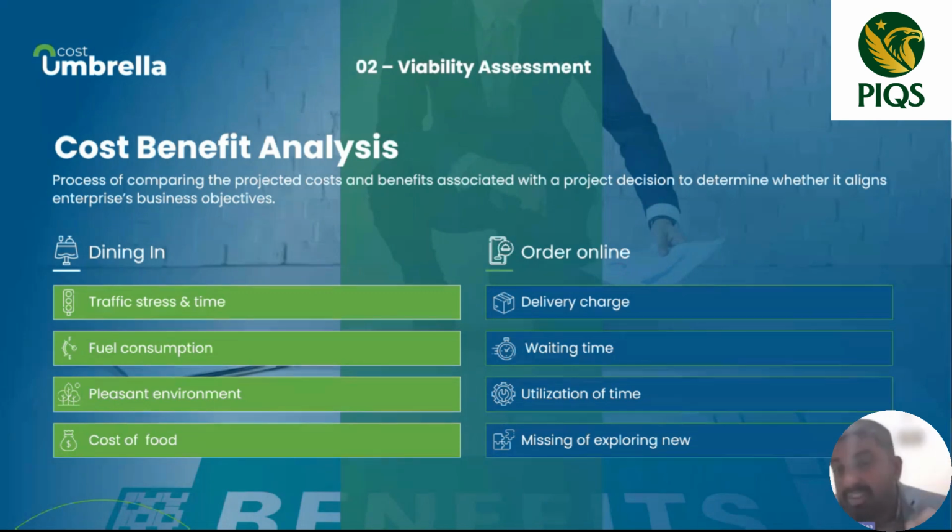But there is a benefit which is an intangible thing, right? Let's say by constructing the highway, a person, let's say an engineer, let's assume you can save 30 minutes of your traveling time every single day. So this will increase your productivity. That will increase the profitability of your company. So these are benefits, right? You got my point, I guess, right? So this is called cost benefit analysis. Rather than only talking in monetary terms, yes, we are talking about monetary terms, which are not directly available. Let's say you are living in a coastal area. Every year there's a flood, right?